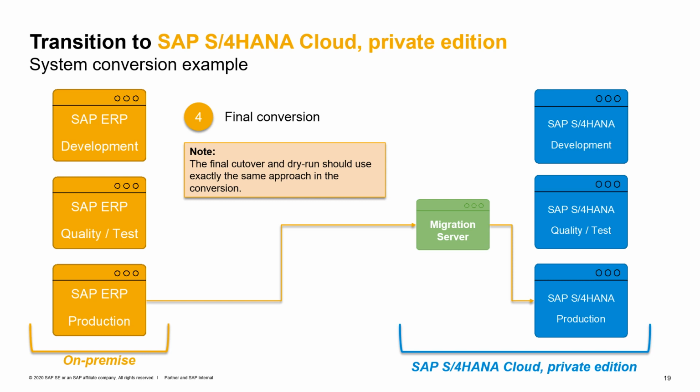With this sequence of 4 steps, we have performed 3 iterations of a sandbox conversion before getting into the final cutover sequence, and this should be enough in the majority of the use cases to correctly test and execute all the steps so that they are validated and ready to be used for a cutover conversion.